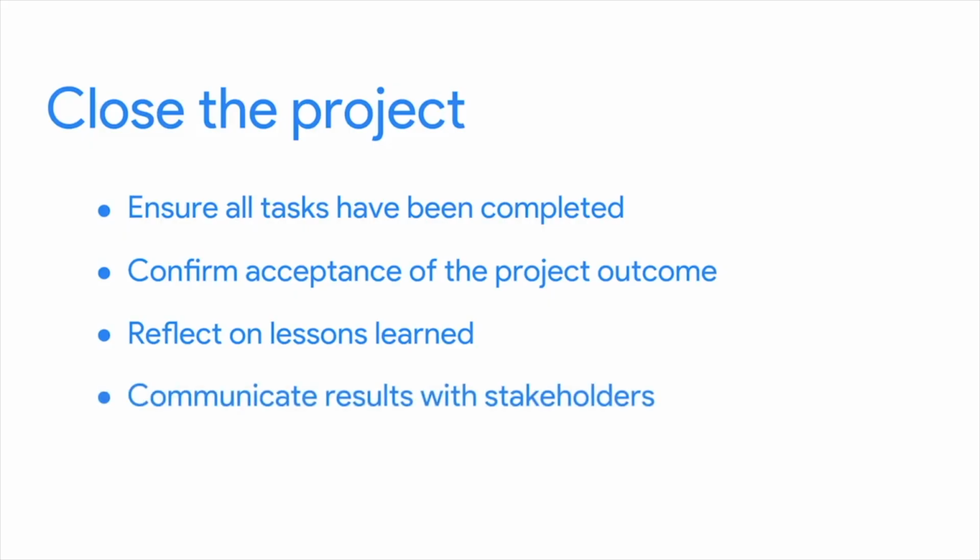Even if everything went great, the notes from your retrospective are also valuable to the people or organization receiving the end result of the project. That's because they can use that information to inform decisions about their business the next time they consider a project. Now it's time to collect all the project documentation that you've created or collected along the way, including all of your plans and reflections, and share the final results of your project with your stakeholders.